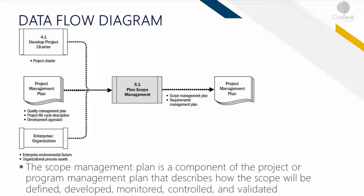Here's a quick data flow diagram. You have the project charter coming from the previous chapter, which is made part of the project plan itself for the organization. The scope management plan is created, and then you end up detailing out the requirements of the management plan — which is a component of the project or program management that describes how the scope will be defined, monitored, developed, controlled, or validated.